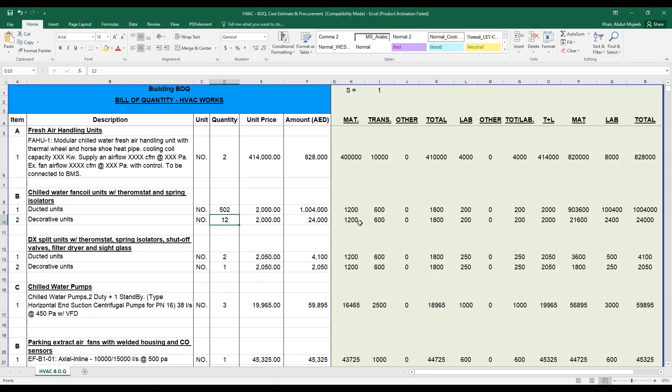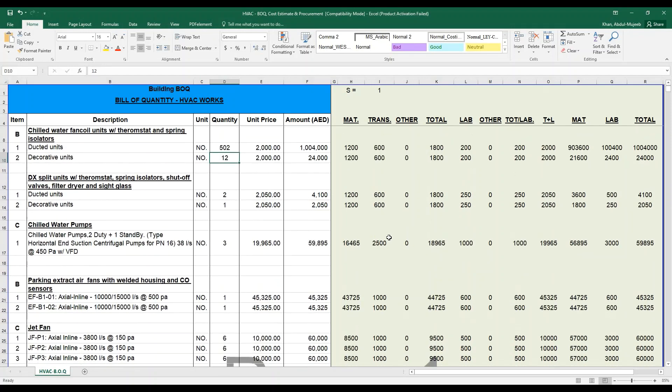A price estimator or cost estimator has to be involved, or if you yourself are a cost estimator, you will know this particular cost by getting quotations from the vendor for the project requirements. Depending on your vendor quotations, you will be providing your cost here and coming up with this type of quantities and pricing of those equipments.